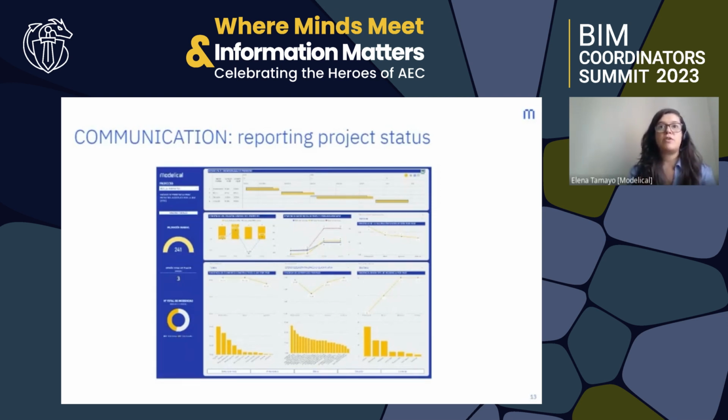We can analyze the performance and the trends of the KPIs weekly or maybe at the end of a milestone. For example, we can see if the models are delivered on date or how many active issues we have for each phase. So if we analyze it correctly, we can adjust our targets. If we understand where the flaws are, we can reinforce the work in these areas.